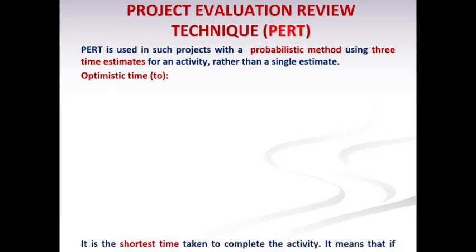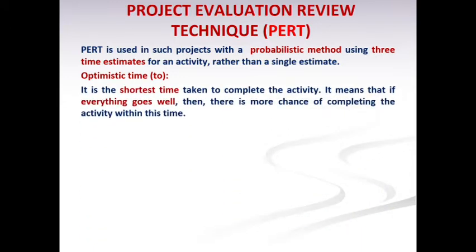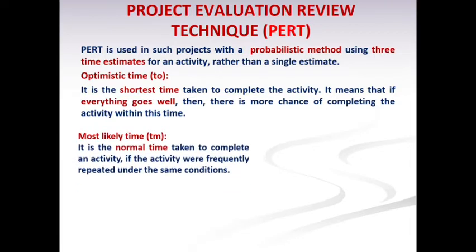Optimistic time is actually the shortest time taken to complete the activity. It means that if everything goes well, then there is more chance of completing the activity within this time. Next is most likely time. It is a normal time taken to complete an activity if the activity were frequently repeated under the same conditions.